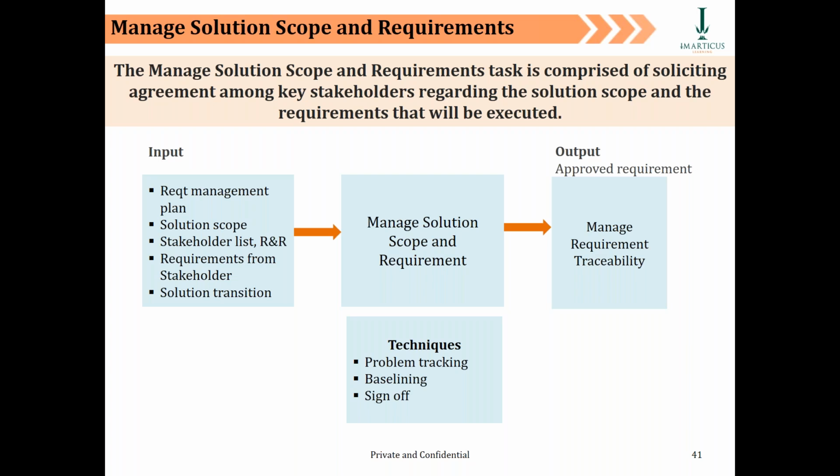All right. But if we include that, it will lead to an addition of 500 man days. Now, from the contract, you're already sitting on 1,000 man days. This means you need an additional component of 500 man days, but all the requirements which can be delivered within 1,000 man days are now baselined. Whatever is extra is beyond baseline.